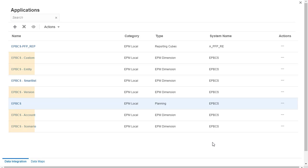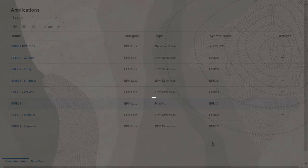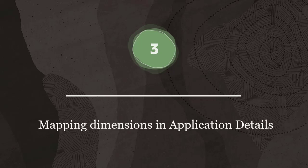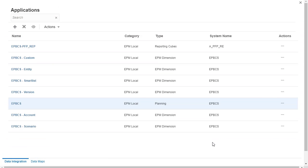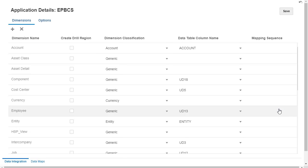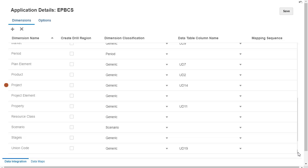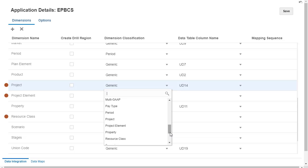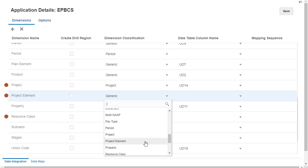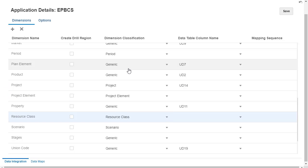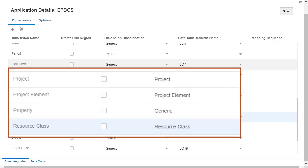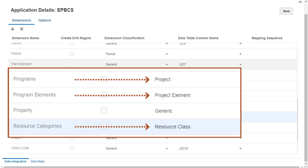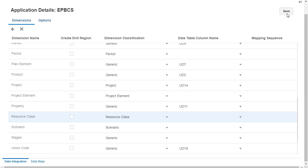An application is created for each dimension and one for smart lists. Step 3: mapping dimensions and application details. In Application Details, for the Base Planning application, you classify these dimensions: Project, Project Element, and Resource Class. Classify these dimensions to match their names in the integration definition. If dimensions in the EPM Planning Projects modules were named from the default names, you must map them. Make sure to save your changes.